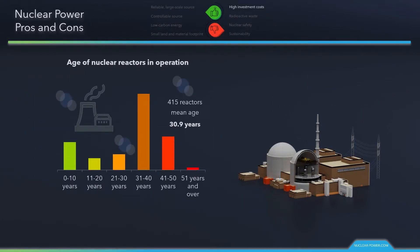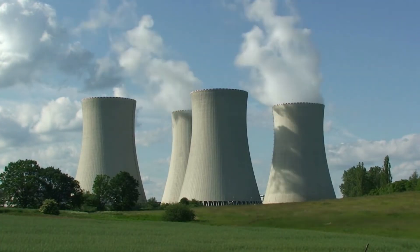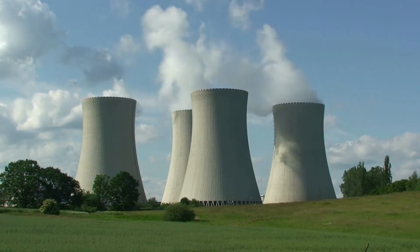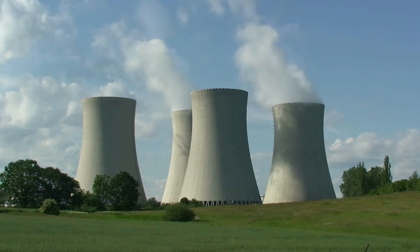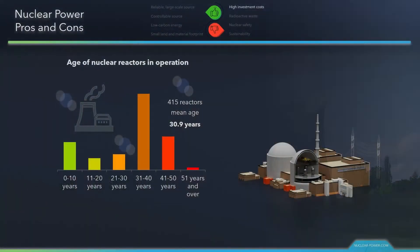First, we will start with high investment costs. Nuclear power plant construction is typical of large infrastructure projects worldwide, whose costs and delivery challenges tend to be underestimated. These new builds require significant upfront investments, which were mostly caused by highly customized designs of large plants, but can be driven down by standardized, reusable designs. This underestimation is logical — the majority of nuclear plants today are approaching the end of their design life, and only a few have been built in the last 20 years.